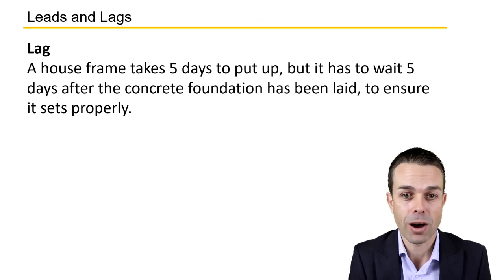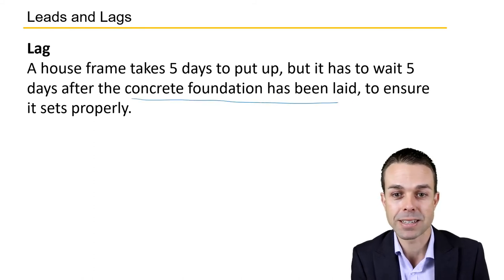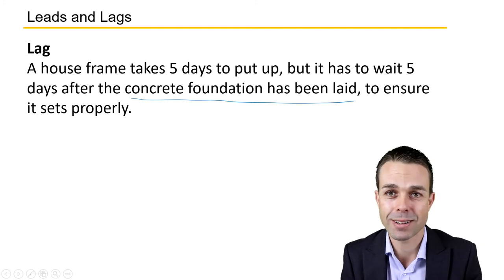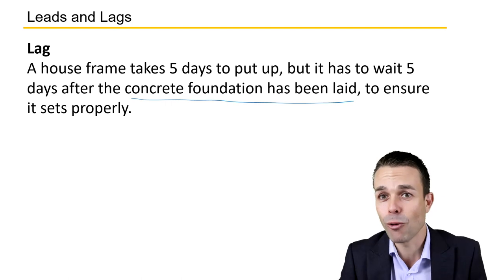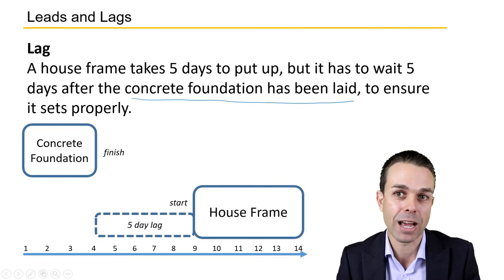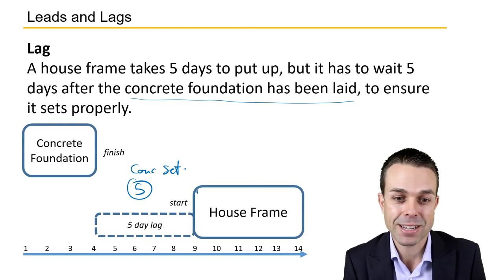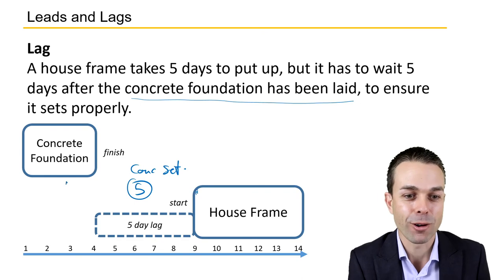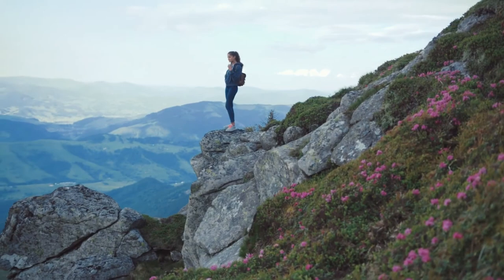Lag moves it the other way. A house frame might take five days to put up, but it also has to wait five days after the concrete foundation has been laid. We don't want to put anything on that concrete foundation in case it affects its integrity — we want to make sure it sets properly. So we have a five-day lag in our project schedule. The second activity is lagging behind the first, and that lag is five days long. That is the idea of leads and lags in your project schedule.